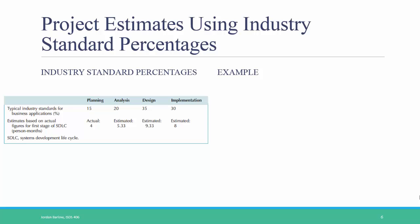Here are some industry standard percentages. While every project is different, on average about 15% of project time should be allocated for planning, 20% for analysis, 35% for design, and 30% for implementation. However, the larger the project becomes, the higher the percentage you'll spend on actual implementation. In many large projects, implementation could be the longest and most expensive phase. Based on these percentages, you can calculate how much time to spend on analysis, design, and implementation based on how much time you've spent in project planning.